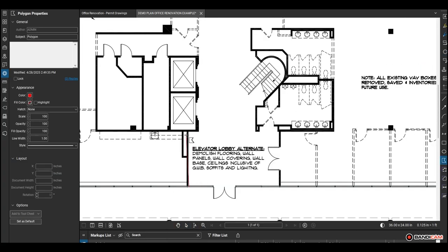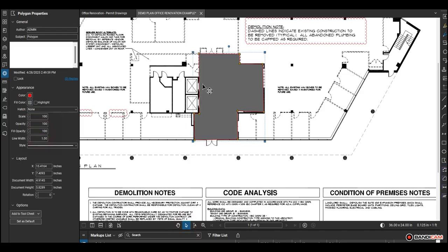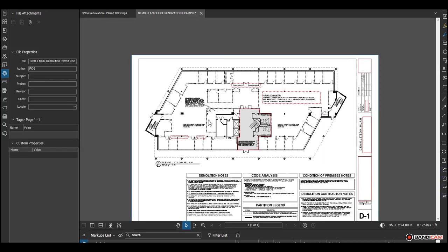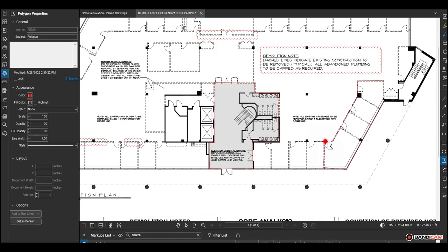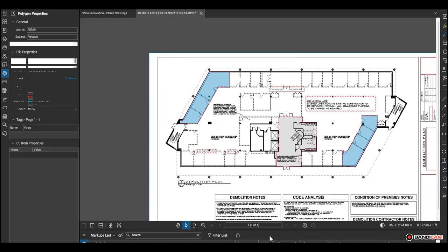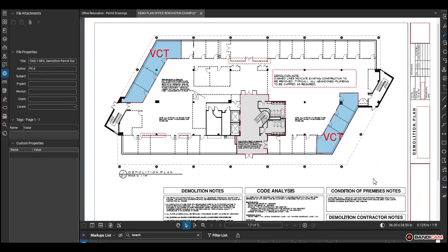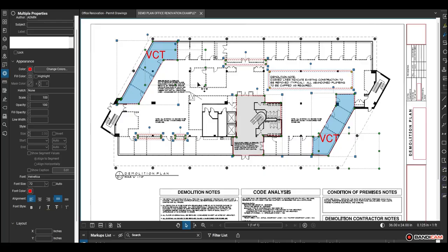The ceiling finishes are acoustical ceiling tiles 2 foot by 4 foot everywhere except the elevator lobby and the bathrooms, which are 5/8 drywall on metal studs. The floor finishes at the elevator lobby and the bathrooms are ceramic tile 12 inches by 12 inches. The majority of the space is 2 foot by 2 foot carpet squares with the exception of certain offices along the perimeter, which are VCT. The casework and countertops are all plastic laminate. That should give us a pretty good idea of what we're doing as we get into the quantity markups.